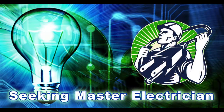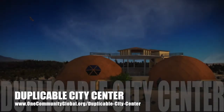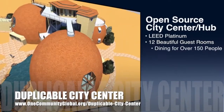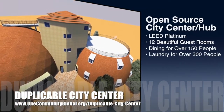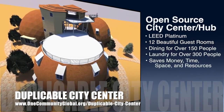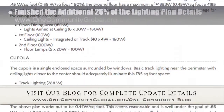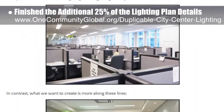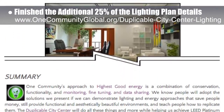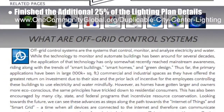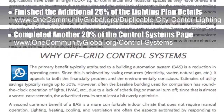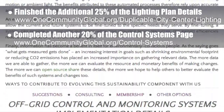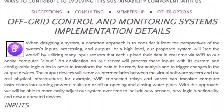Our newest consultant Scott Thomas and his Shadow Ridge Signature Architecture Program team began working on the EarthBank Village shower and toilet domes. Here are the initial bathroom concept images and the initial communal shower design. One Community is also creating an open source duplicable city center designed to be LEED Platinum certified, provide 12 guest rooms, dining for over 150 people, and laundry and recreation space for over 300 people, all while saving money, time, space, and resources. This week the core team finished an additional 25% of the lighting plan overview details for the Duplicable City Center lighting plan page, and completed another 20% of the control systems page, bringing it to 30% completion total.